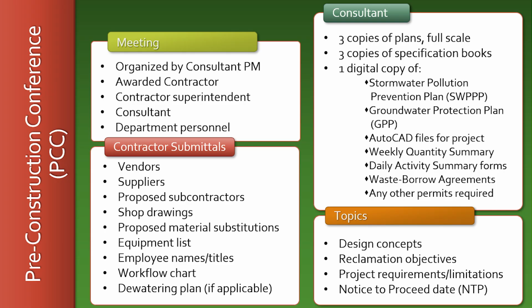The pre-construction conference is an in-person meeting with the contractor who has been awarded the contract, the contractor's project superintendent and any other relevant staff, the consultant, and the department members related to the project. Landowners need to be invited to this meeting but are not required to attend. This meeting is organized and presided over by the consultant's project manager. Inspectors are responsible for attending and videotaping the meeting. All recordings must have clear audio and all questions and answers must be recorded. The recordings must be uploaded into AML-Net within 48 hours.